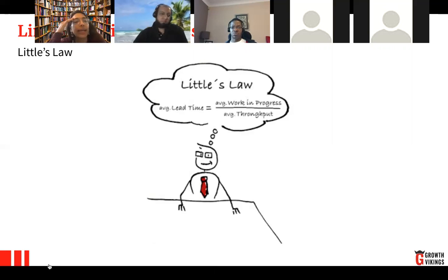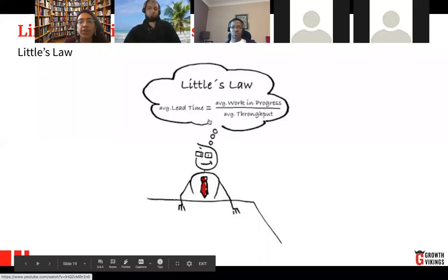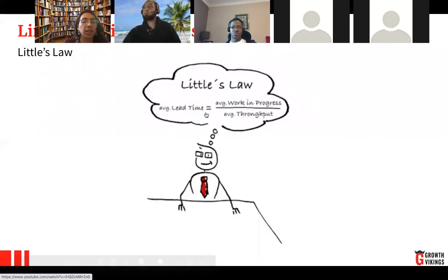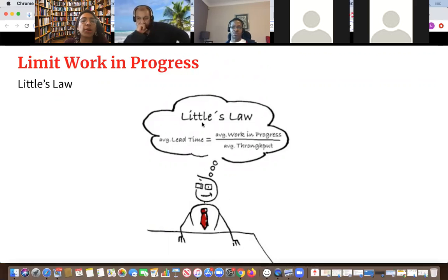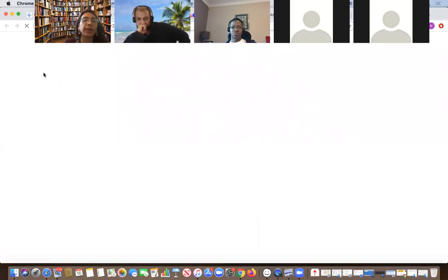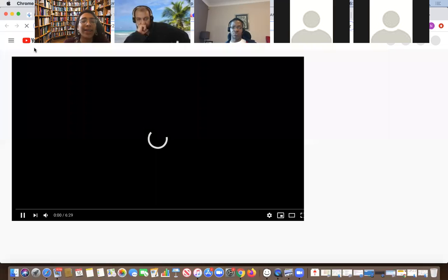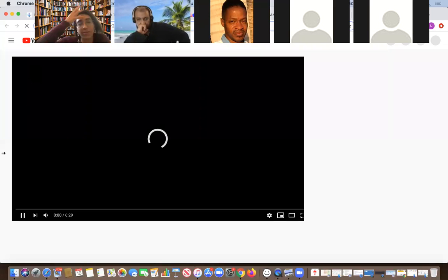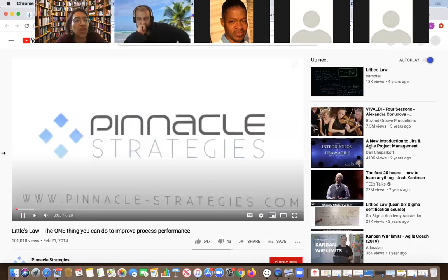All of this has behind it what we call Little's Law. When we talk about Little's Law, there's a very simple way for us to start understanding. Little's Law seeks to tell us basically that the average lead time is equal to the average work in progress and the average throughput. I got for you here a pretty cool video so you can see pretty quickly what we're talking about. As you see, there are a lot of lean elements in Kanban. Kanban is just bringing Kaizen, continuous improvement, into the organization, and it's reducing muda, or waste.